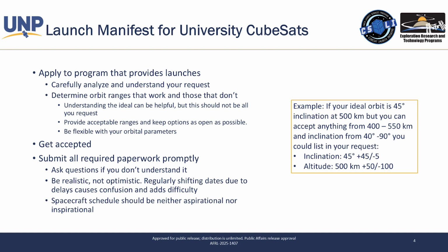So once you actually are prepared to apply for one of these programs, you're accepted. Make sure that when we ask for paperwork, either questionnaires, you should submit all that paperwork promptly. Ask questions if you're filling out a safety data template you don't understand or you don't understand the testing. When you're looking at your schedule, we always say that your schedule is neither aspirational nor inspirational. It should be a realistic schedule with adequate margin that you actually can meet, because there are consequences if you cannot make your launch date, right? Consequences that we will get into a little bit later.